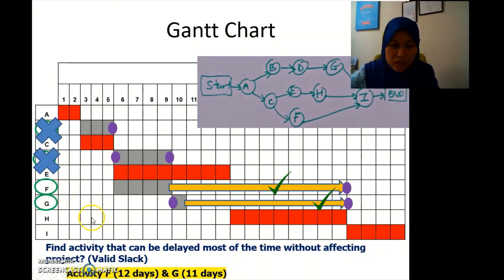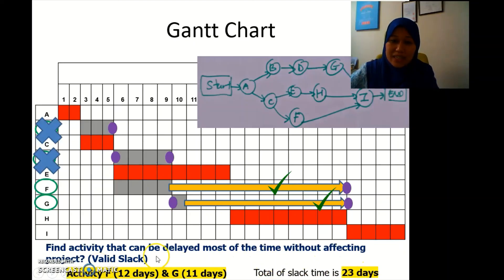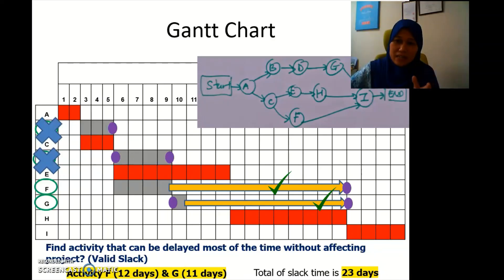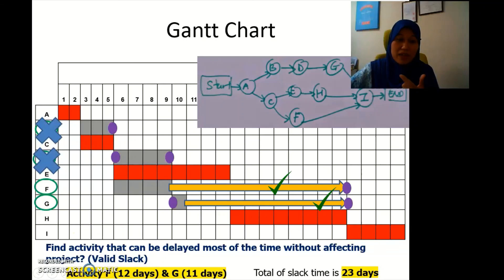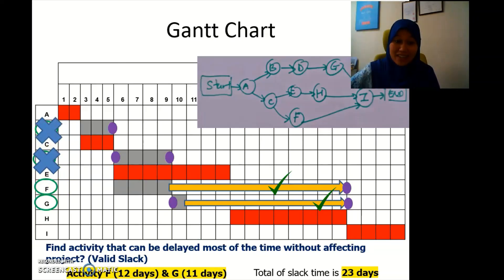So only F and G have valid slacks — F with 12 days and G with 11 days — giving a total slack time of 23 days (12 plus 11). We have completed the network diagram, calculated earliest and latest start and finish times, determined the project duration of 25 days, identified the critical path A–C–E–H–I, and validated the slack. The critical path activities cannot be delayed. I hope you understand — thank you!